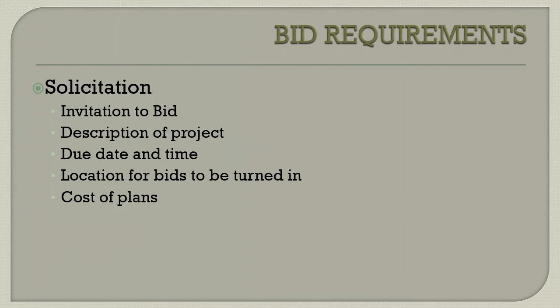The cost of the plans. Sometimes municipalities will sell the plans for a price, and oftentimes, if you are ever in the position of creating plans for a project, my recommendation is you charge a reasonable sum, not just to recover the cost of printing, which is relatively insignificant, but charge, let's say, $100 for the plans. This tends to weed out the 2 guys in a wheelbarrow who want to just pick up the plans for the sake of it and really do not have the ability to do the project. So this way only serious bidders are going to get to buy the plans.